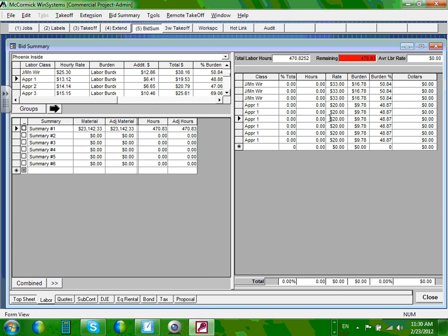We're not done yet. Now we need to assign how many hours each one of those guys is going to work on the project. If you don't know, we have 9 people, right? Those 9 people are going to be working, I'm going to assume, and again, assumption, you have to decide as a project manager, the 9 people actually going to be working the same amount of time. Okay, so take 100% of the hours, divide them by 9, will give you what? 11, right? See where I'm going to come up with the 11? I have 100% of the time, I'm going to divide it equally between 9 people. So I'll give you like 11, and one of them has to do 12.